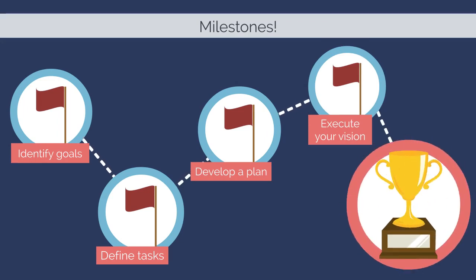Once this basic support framework is in place, you should establish a timetable, milestones, and assignment chart for all inventory activities. The timetable should include clear deadlines as well as flexibility measures that allow you to adjust the schedule as needed. It should also lay out the schedule of department and unit inventories and estimates of the staff hours necessary to complete each task, as well as an initial survey of your records management status and progress.